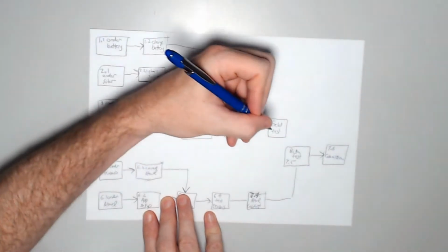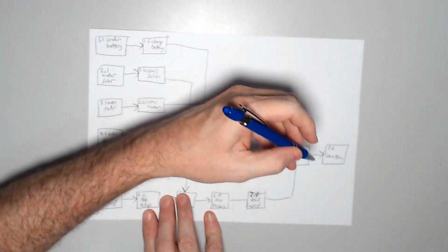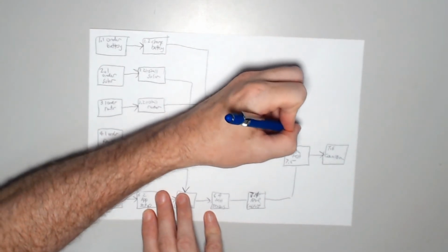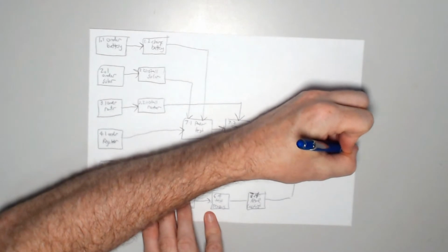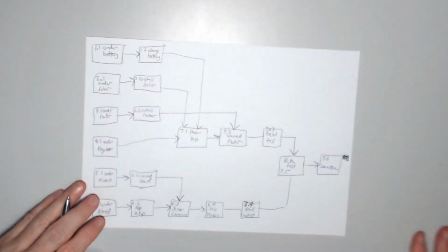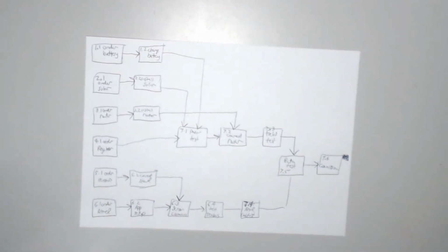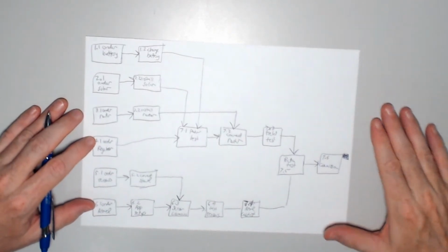and this is where we switch numbering here. We went to 7.3. And then that will feed into the final beta test. And this is where we're actually finished, stop, end of the schedule. Yeah, so that's my interpretation of the dependencies between the activities here, so you could consider this to be a network diagram.